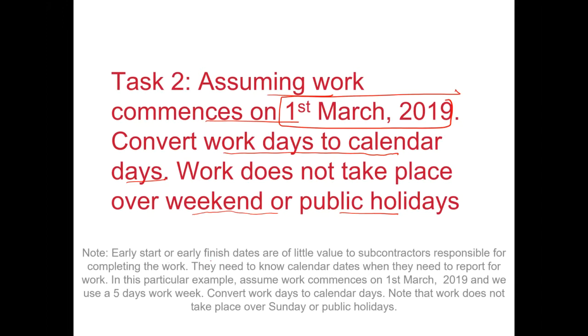Now, mind you, early start or early finish dates are of little use to subcontractors responsible for completing the work, right? So you cannot tell, for instance, the roofing subcontractor, "Please turn up on the seventh day of my project." It would mean nothing to them. You have to give them a calendar date. So you have to tell them to turn up on 1st of April, and you must be out of my site by maybe 5th of April. So you have got 4 days. They need to know the calendar dates when they need to report for this work.